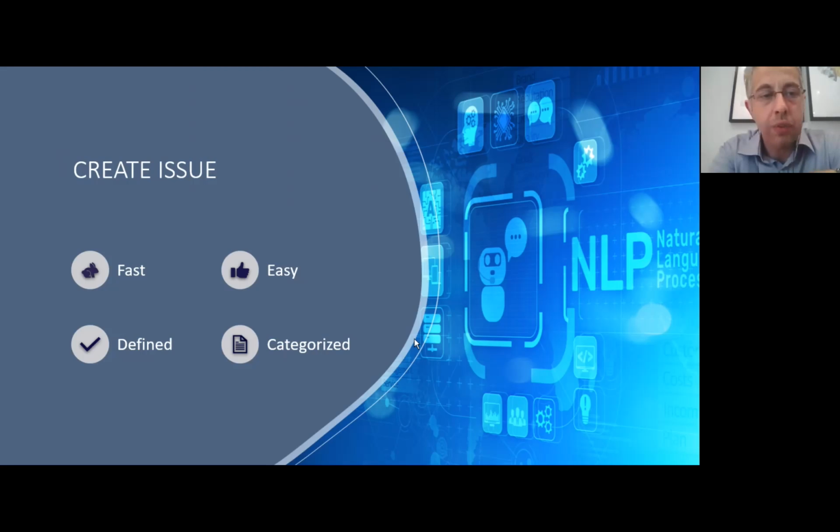So I think the definition of the problem is so important in the issue creation step, and so is categorization of the issue. Because if you don't categorize the issue in the first place, then it starts to be a big problem for you: who will be responsible, and which discipline will work on it. Is it about architecture, about BIM, about the construction site team? You have to understand this clearly beforehand. If you don't do this, issues start to wait. Who will be responsible? It takes too much time. If it is critical, it creates huge damage in your project.